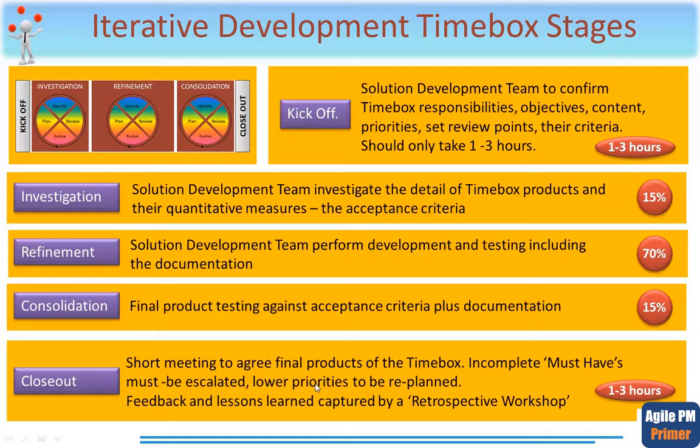The sign-off or acceptance is done in a formal, documented manner, and the opportunity is taken at the end of this time box to look back to see if there are any lessons that can be learned, either in terms of the development work that's been carried out or the way in which the time box was managed. And this short feedback and lessons session could be captured by a mini retrospective workshop. If the time box went well and all products have been accepted, this session could be very short indeed, and may even be combined with the kick-off session for the next time box if there is one.